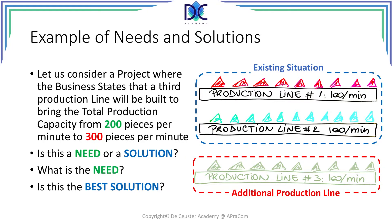The first thing to do is to find out what is the need that has to be covered by the project. We have a production capacity of 200 units per minute and the final result is 300 units per minute. So the need can be defined as increasing the production capacity by 50%, or increasing the capacity from 200 units for the factory to a total of 300 units. This offers a few more possibilities to consider. When you look at the need, you can identify at least two additional solutions that can cover this need.